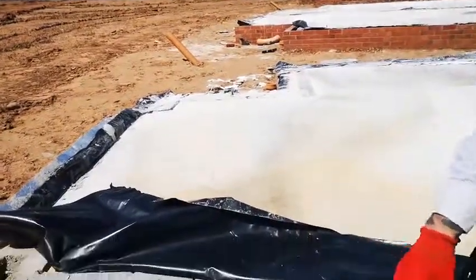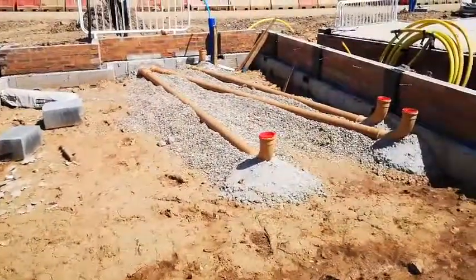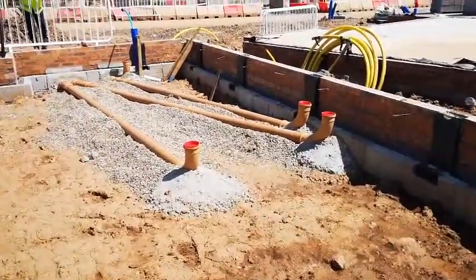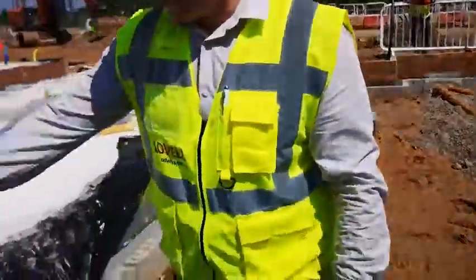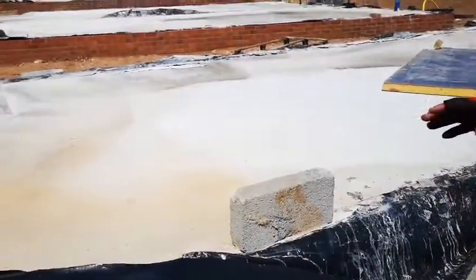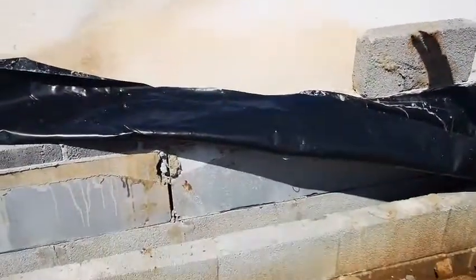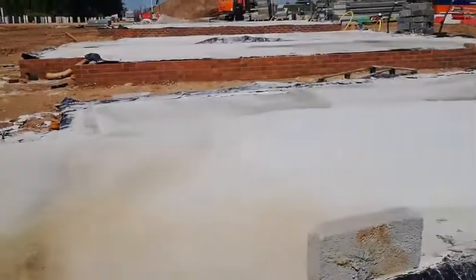Before that goes on, if you pan round to the right, you'll see the underfloor drainage, which goes on beforehand, and the telescopic vents which allow airflow underneath the floor. Once the floor planks go on, a thin layer of insulation goes around the perimeter, your DPC, and then the floor itself is cast, and that's your structure up to DPC level, ready for your superstructure bricklayers.